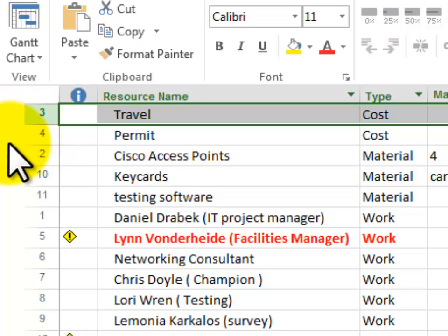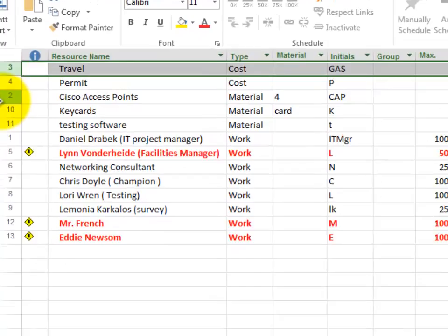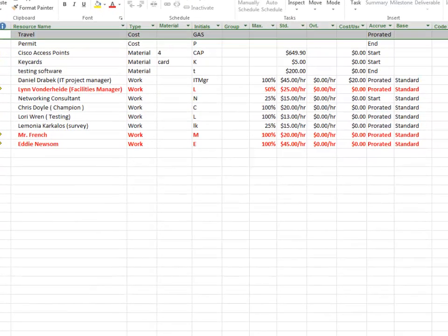And you'll notice that in cost of travel, it's got a lot of different possibilities to it, but we only fill in a cost because we're actually going to assign that cost to the task when the task occurs. So that if the price varies up to that point, we can certainly adjust it. So we might say that our budget would call for a travel cost of $300, and then when we actually incur that cost, let's say it comes to $256, we could then say our actual cost was $256, even though we budgeted for $300.